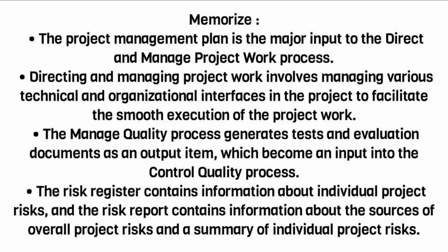Memorize: the project management plan is the major input to the direct and manage project work process. Directing and managing project work involves managing various technical and organizational interfaces in the project to facilitate the smooth execution of the project work. The manage quality process generates tests and evaluation documents as an output item, which become an input into the control quality process.